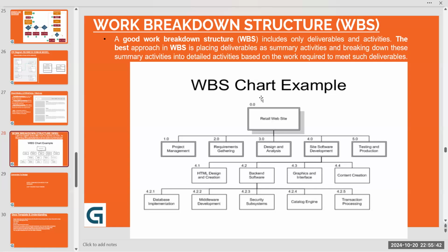So yes, from backend software, we have all these further levels of activities coming in, and these all are a part of database implementation or database activities. So herein, assuming you're working in security subsystems, if you are a part of that team, working on database security, what would be your WBS? Four point two point three. Absolutely right.